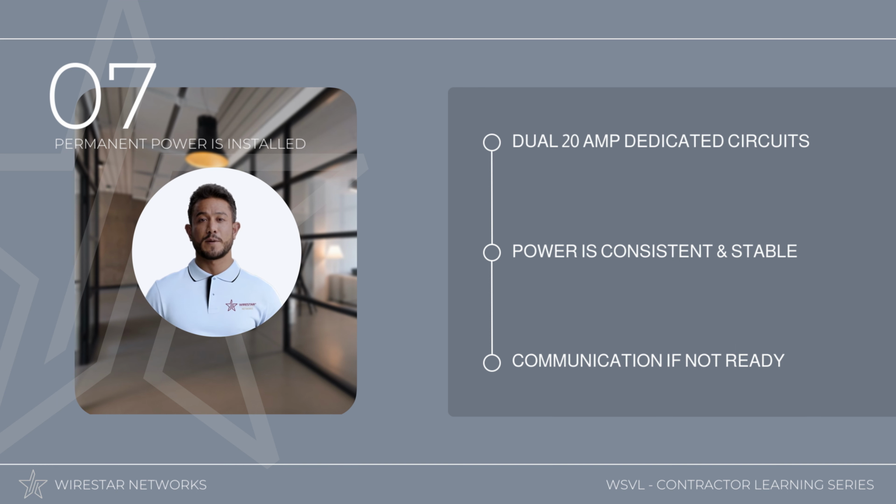WireStar will not stand up an MDF on generator or temporary power under any circumstances. We understand the complexities of testing, and passing electrical inspections are not always predictable or easy to control. To prevent damage to our networking equipment, MDF mobilization should only be requested after permanent power has been turned on.